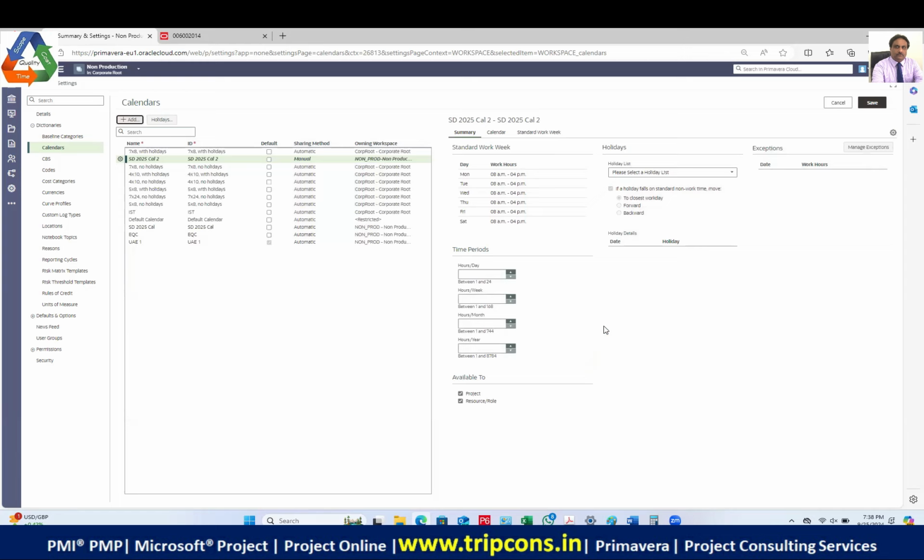Now you have to tell what the time period is. The time period in this calendar is 8 man hours per day. For every company it will be 8 man hours per day, and the hours per week depend upon the work culture. So this is a 6-days-a-week calendar. How much should be the man hours per week? 48, right? Okay, now you come to the next. So 48 multiplied by 4, how much is that? 192, okay. Don't go by the prompt, use your calculation, right?